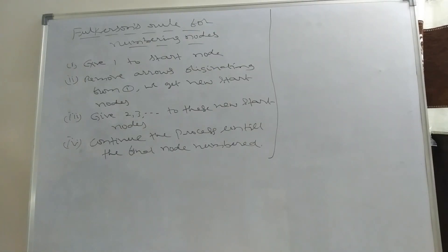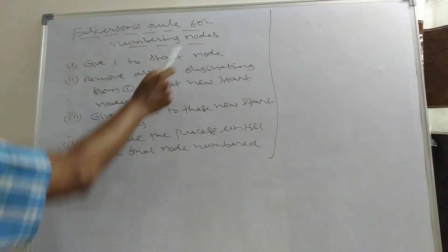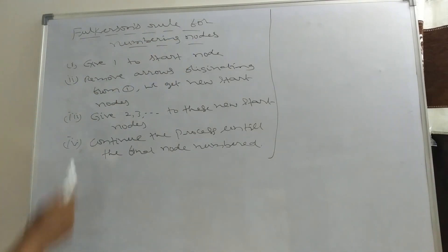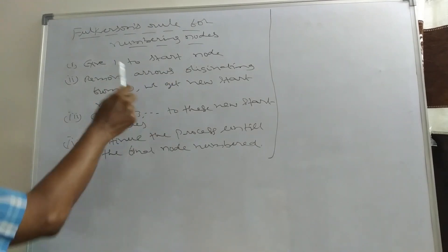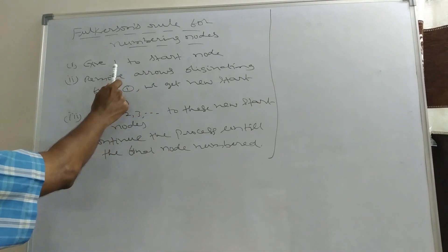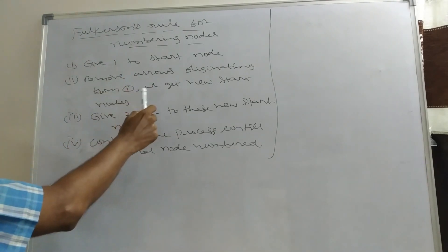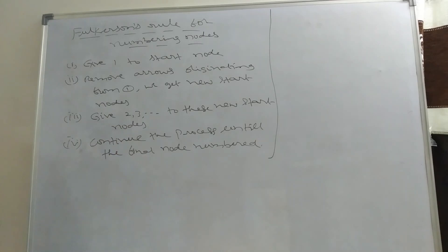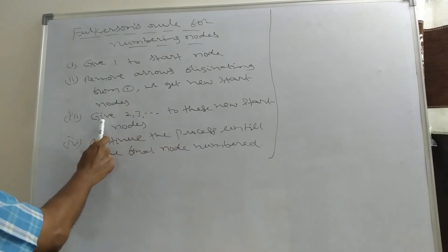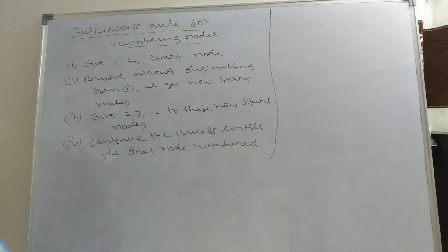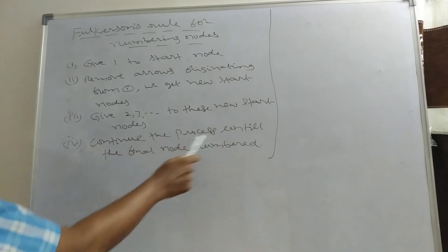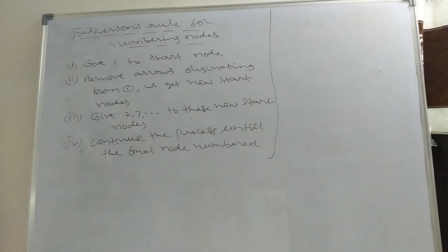There is a rule for numbering nodes called Fulkerson's rule. Assign number 1 to the start node. Remove all arrows originating from node 1; the resulting nodes with no incoming arrows form a new set of starting nodes. Assign consecutive numbers 2, 3, etc. to these. Continue the process until the final node is numbered.